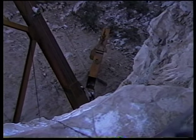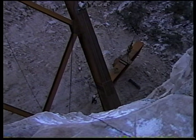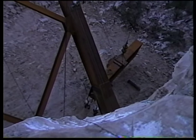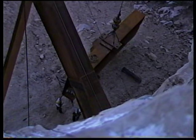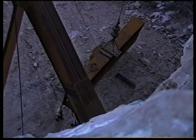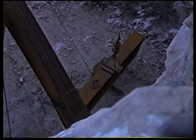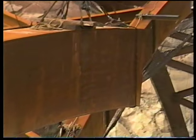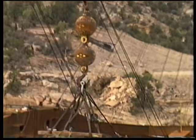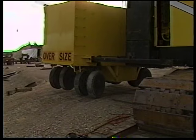were stockpiled down on the keyway bench as room would allow to keep the guy line hookups to a minimum. The precise procedure used for placing each rib was demonstrated here in setting the last rib, number 8, north. This rib was placed at a radius of 273 feet. First, hook up to the rib, hoist, and swing until the boom points in the direction of the set point. Second, hook up the 2 rear guys but leave them slack.